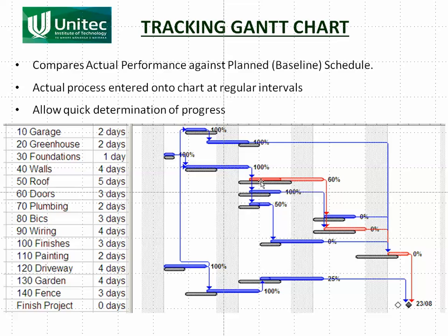So now you can see that we're running a bit late. And you can see it's 60% complete, so that's why that red is that color, and we anticipate that it's going to be another so many days to do this. This is all skewed up because there's weekends here and you don't work on weekends, but it doesn't allow for that. So we're 60% complete here, and then we haven't even started these ones, so that's why they're 0%. Microsoft Project also predicts what's going to happen in the future.